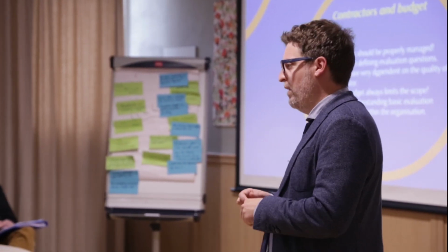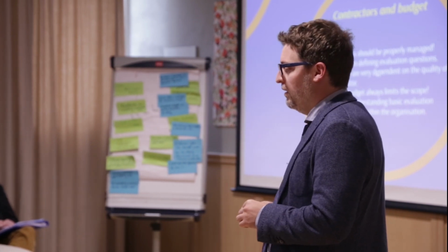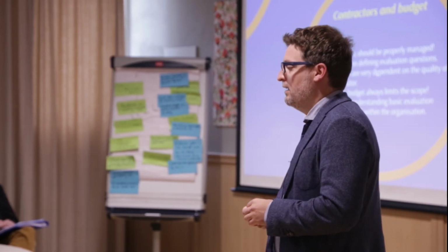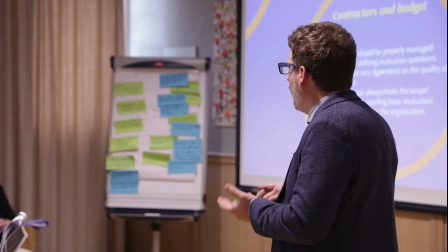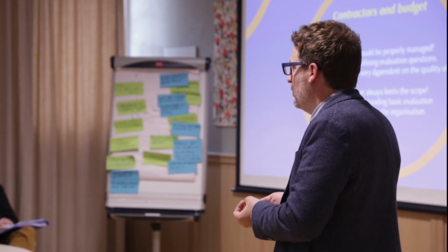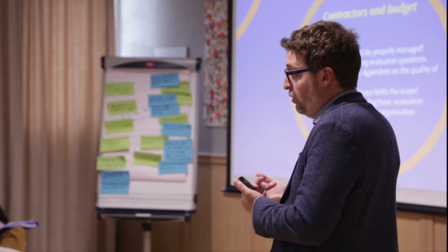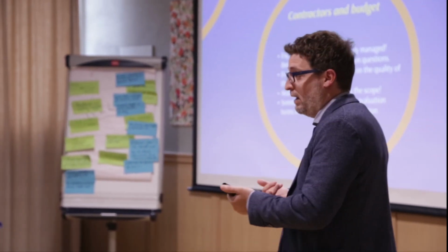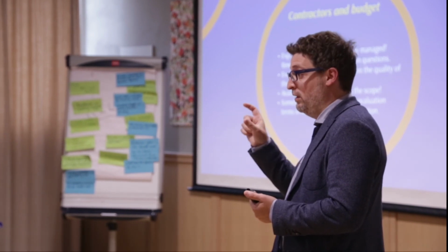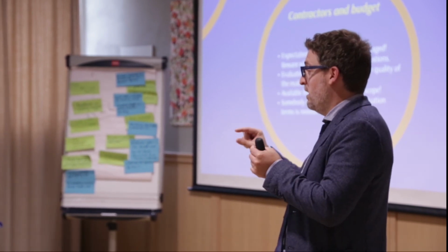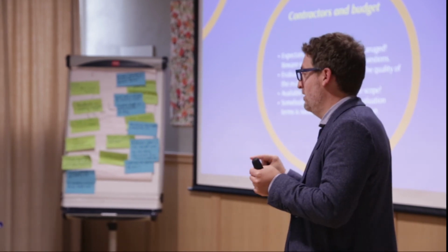But now when we went into detail and really looked at the data, we understand that it is not statistically valid, or it is not fully covering the program area. There are a lot of things like that, and then you have to reconsider. You don't have any other chance. Because what usually happens if you don't have continuous contact with your contractor is that they come back in 3 months and say, we looked at it, the indicator was not covering the whole program area, so we don't answer this question.